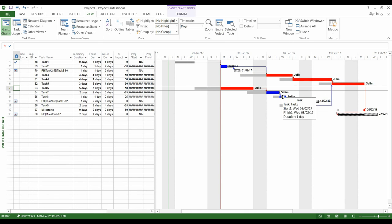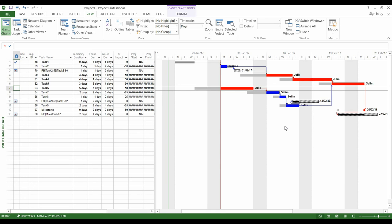This sleeping task not only caused feeding buffers' consumptions, but also a project buffer consumption. However, because this project buffer is not totally consumed, the project is not late yet.